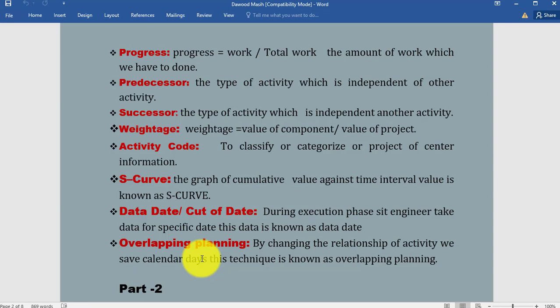Data date or cut-off date: During execution phase, site engineers take data for a specific date. This data is known as data date. Overlapping planning: By changing the relationship of activities, we save calendar days. This technique is known as overlapping planning. Anytime we can change the relationship of our activities, so by changing the relationship we are able to save our calendar days.